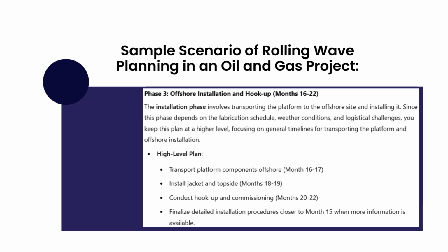Phase 3. Offshore installation and hookup. The installation phase involves transporting the platform to the offshore site and installing it. Since this phase depends on the fabrication schedule, weather conditions, and logistical challenges, you keep this plan at a higher level, focusing on general timelines for transporting the platform and offshore installation.